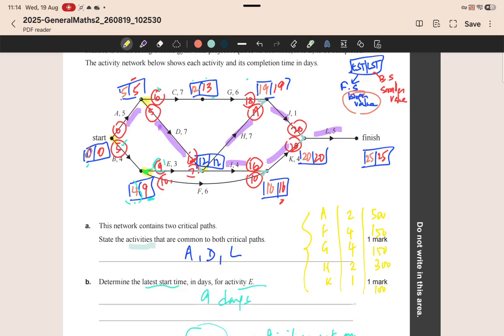Now we look at the activities that are on the critical path, and they are A, H and K. Now from what we can see, F and G are not on the critical path, and so it would be really not much use reducing them unless we first reduce activities on the critical path, and if that by chance gives rise to another critical path, then we could look at maybe reducing F and G if they are on the new critical path.